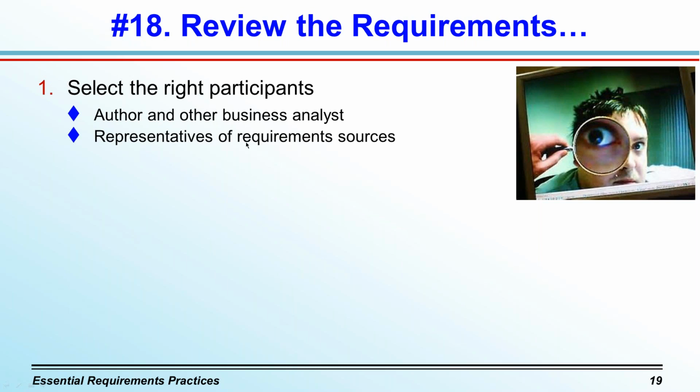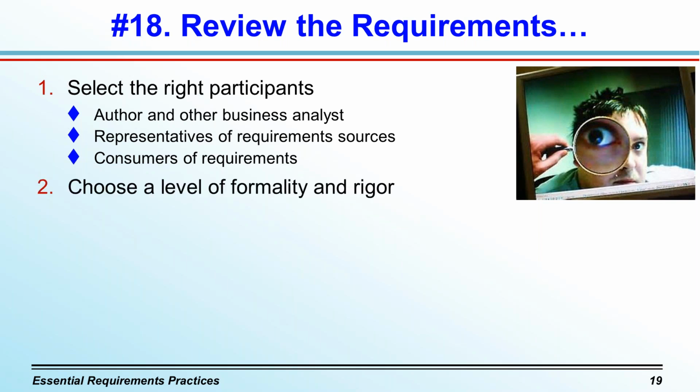So to validate the requirements, you also need reviewers who supplied the information that led to the requirements. These could be representatives of various user classes, maybe marketing staff, and the author of any higher level or predecessor system specification. Finally, people who must base their work on the requirements. I call them victims of the requirements. They also make good reviewers. Architects, designers, data analysts, developers, testers, they'll all find different kinds of issues.